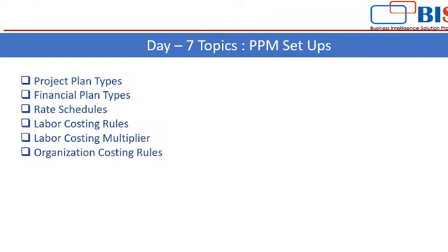Then we have seen how to create the project plan type, and while creating the template you have to select the project plan type. Without selecting the project plan type you won't be able to proceed further. So this is a very mandatory setup, and it is used for planning purposes. Also, the financial plan type is used for budgeting purposes.